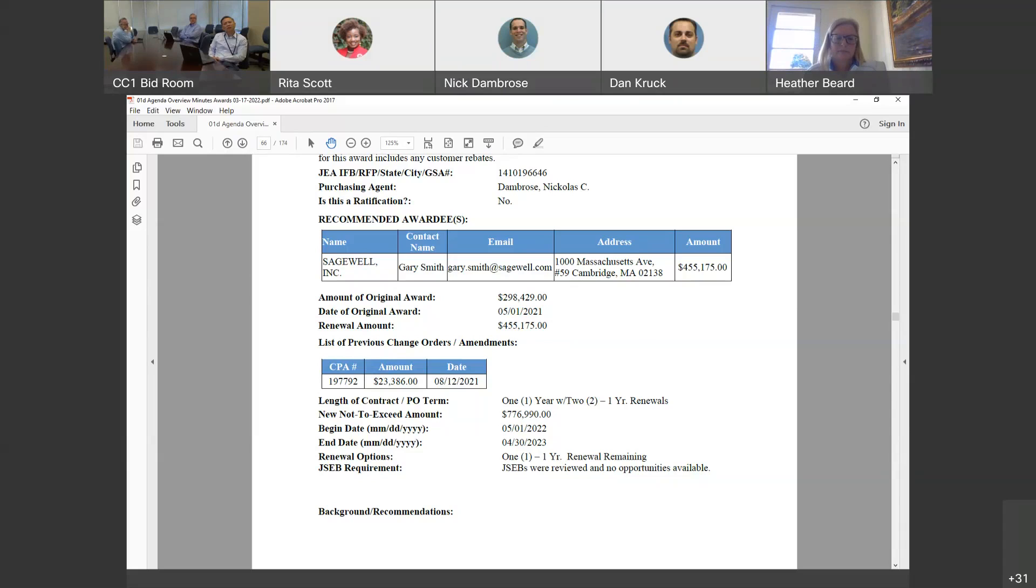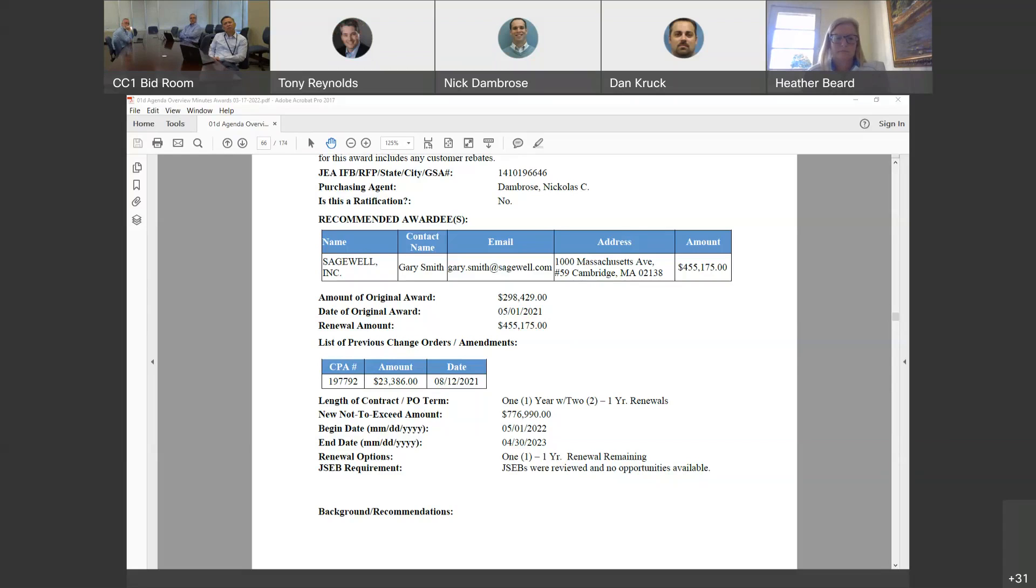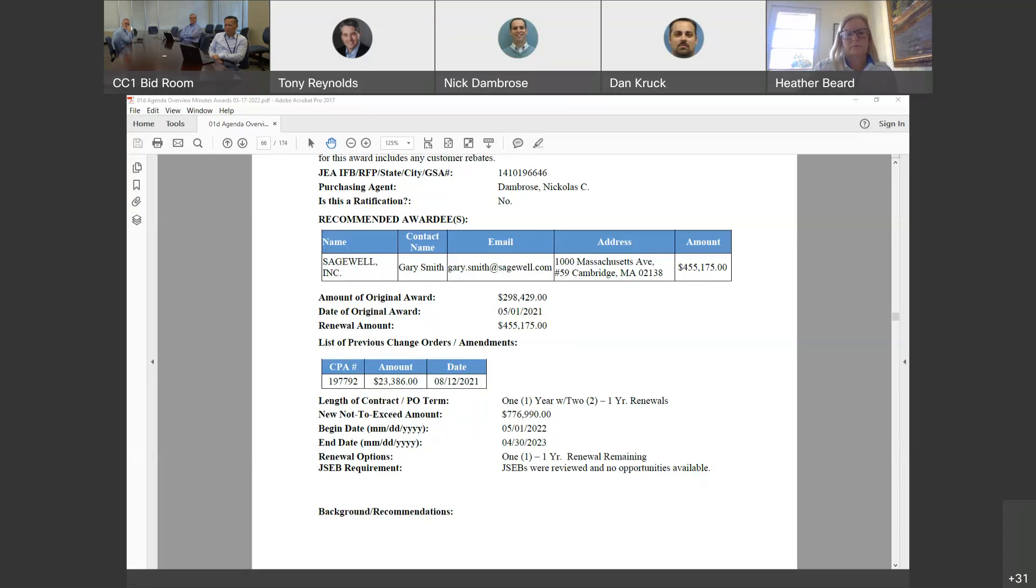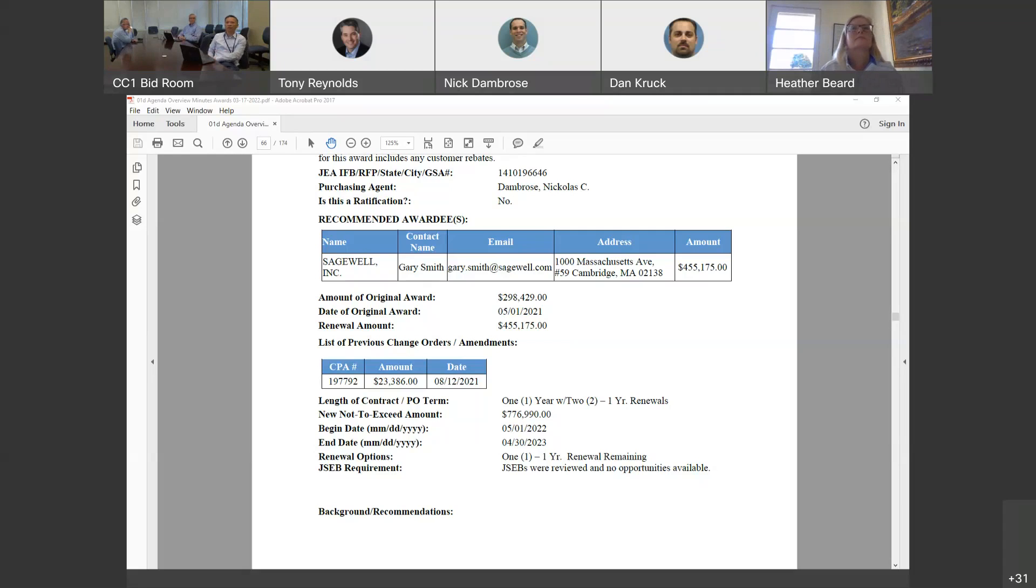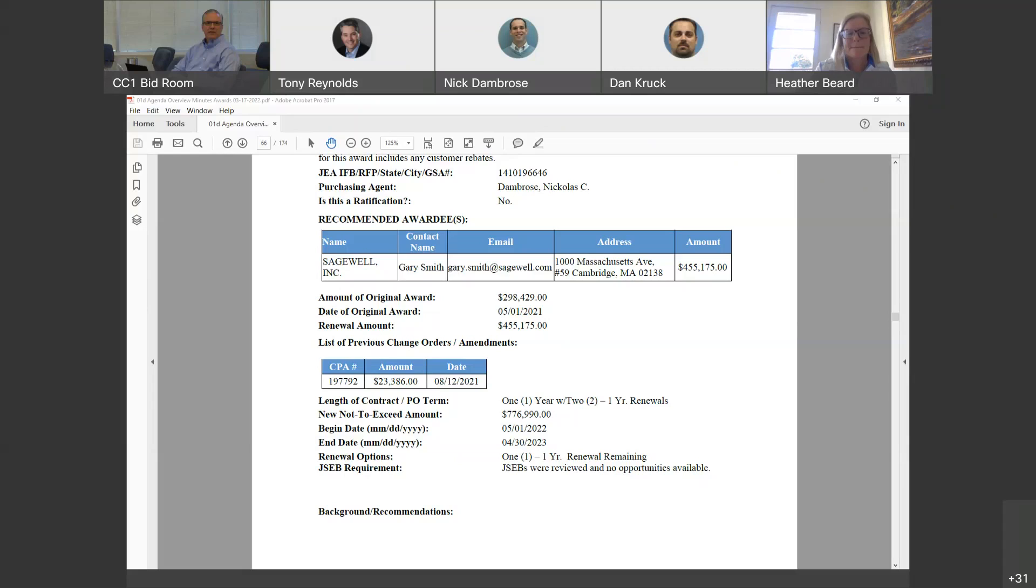Any questions on this one? This is Haibu. I have a question procurement-wise. I really wanted to understand if the original intent was to award a contract with two one-year renewals, so the potential value would have been more than $300,000, why didn't we go out as a formal award at the very beginning? Is it because the one-year renewals are not guaranteed? Yeah, the renewals are not guaranteed. Maybe they just started the program and those are optional renewals. So I guess the program was successful so we exercised the renewals.